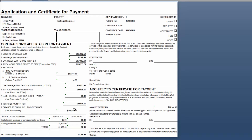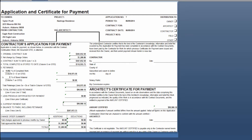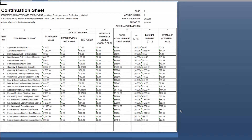After that you will see the balance to finish, which is what you have not yet billed for, and then a summary of all the additions and deductions to the job, which will be the change orders and credit memos that you have applied. Once you've reviewed this and verified that everything is correct, you can continue to the continuation sheet.